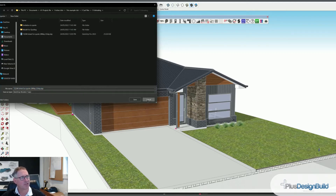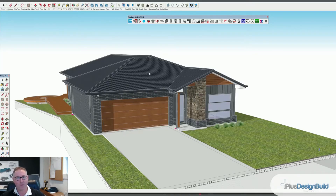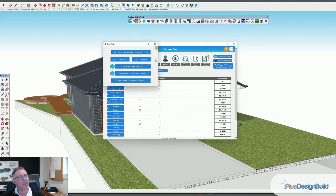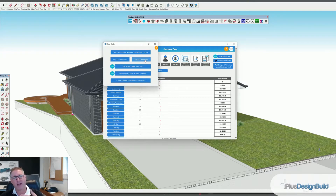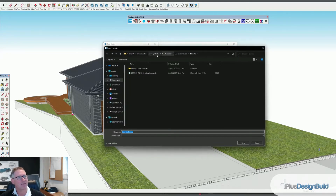I'm going to cancel because it's already saved. Then the next thing I do is go to my takeoff — you'll notice at the top of the takeoff when it opens that it actually has four or five little tabs that we would use to export. Going to Cost Codes, I would then export my cost codes. The only time I would export my cost codes is when I have an update in Xero, which we synchronize with, or if I had an update in cost codes — added a new cost coding. I'd probably do that maybe once every six months.